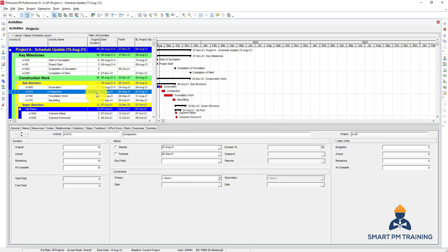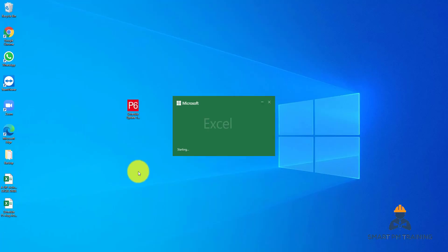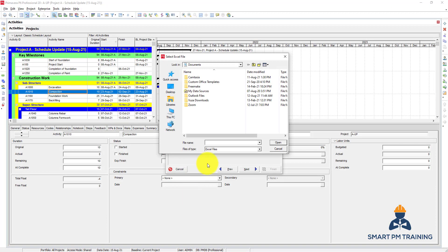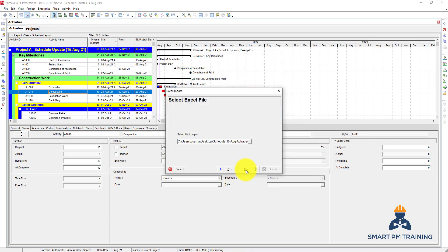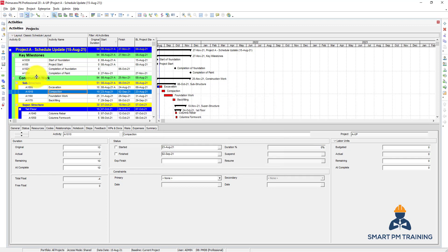Now you will see that Compaction is 10 days instead of 7 days. If you import and choose Excel but did not remove the relationship and resource sheets from the file, those tabs will be activated during import because Primavera will recognize there is one sheet for relationships and one for resource assignments. Since we deleted those two and kept only Activities, only the Activities subject area is available to select. This covers the export and import functions in Primavera P6.